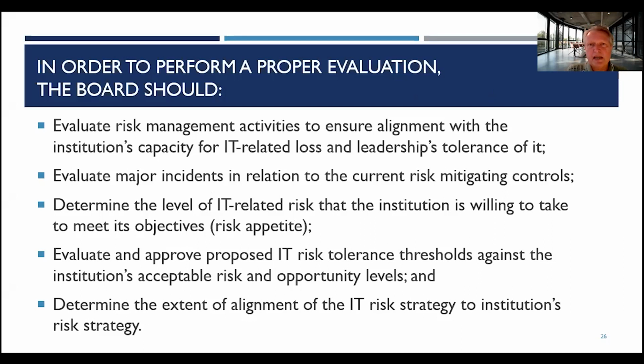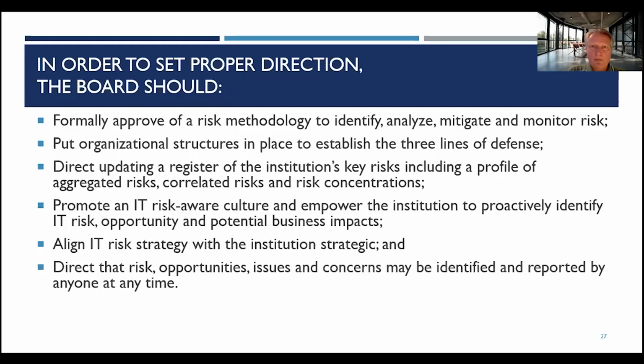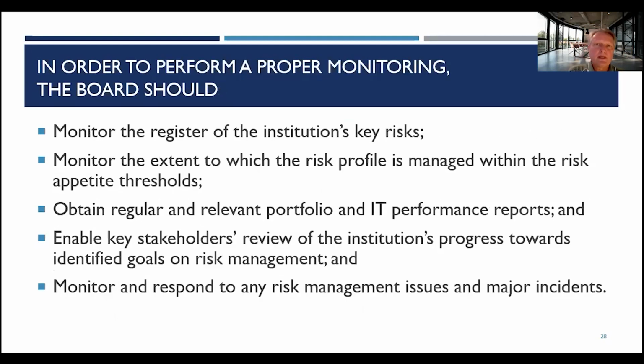But you need to understand, we need to evaluate the risk. This goes through the risk department, and the risk committee is going to look at it. So there's the evaluation, new trends that are emerging. We're going to see if it has an effect on our business, and we're going to update our risk register. This is a register where you put in all your risks, and every time the risk committee meets, they pull up this risk register to see, hey, how are we doing with the risks that we put on here? So when things change, the board needs to set new directions to management, and also the monitoring should be there.